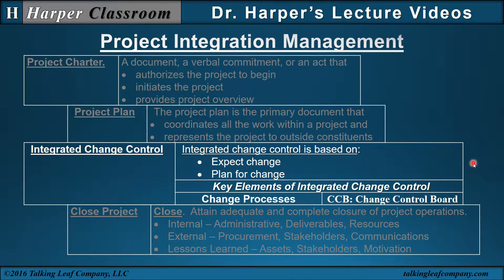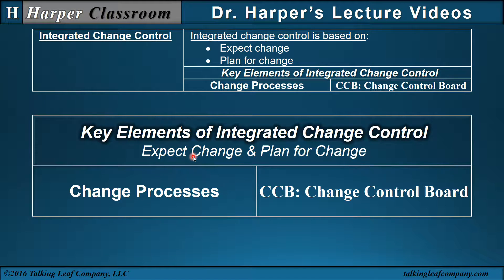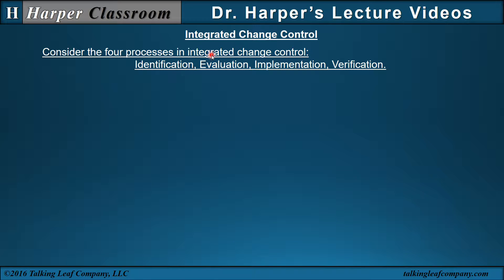Next, let's look at integrated change control. Integrated change control is based on two mandates: expect change and plan for change. The key elements are change processes and the change control board. Because of the unique nature of projects and the dependency on finite time, change processes must be defined, communicated, and followed. The change control board, as the decision-making body for change, is responsible for strict implementation of these processes. Consider the four processes in integrated change control: identification, evaluation, implementation, and verification.